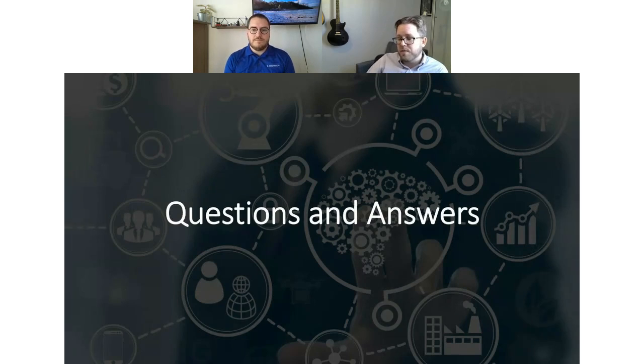So honestly, what this might just mean is that it might change some of your perspective on the way that you deploy Agile systems within a development environment, right? You might want to do a couple of sprints in a dev environment and have people working with simulated data before you do your plant floor deployment, and do some documentation and validation that might be needed to support that. If you have more questions around that, I can hook you up with our Life Sciences Strategic Initiative Director, Brian Hayes, who lives in the life sciences world in validation every day and can probably give a much more thorough answer than I can.